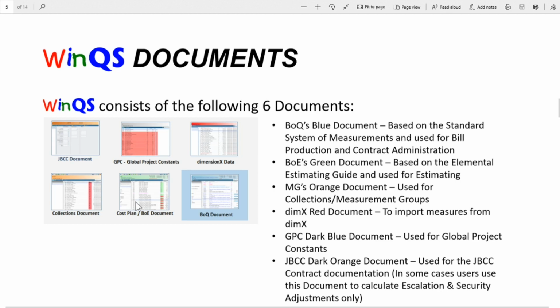If you've set up a pro forma document, for example, office block, and the typical items that will be measured in an office block, the next time when you have another office block project, you'll be able to just create a new project and copy it from that project without the dimensions. Then you would have maintained all the links that you did in the pro forma example for offices, and so you save a tremendous amount of time because you can use the data over and over again, together with the prices that was included there.